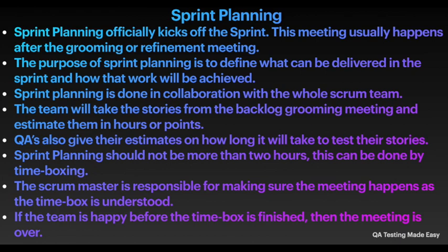If you never did sprint planning before, you can follow this general rule. Give half of the time for testing versus dev's time. Example, if a dev gave 5 hours for his or her story, for testing you can give about 2.5 hours.